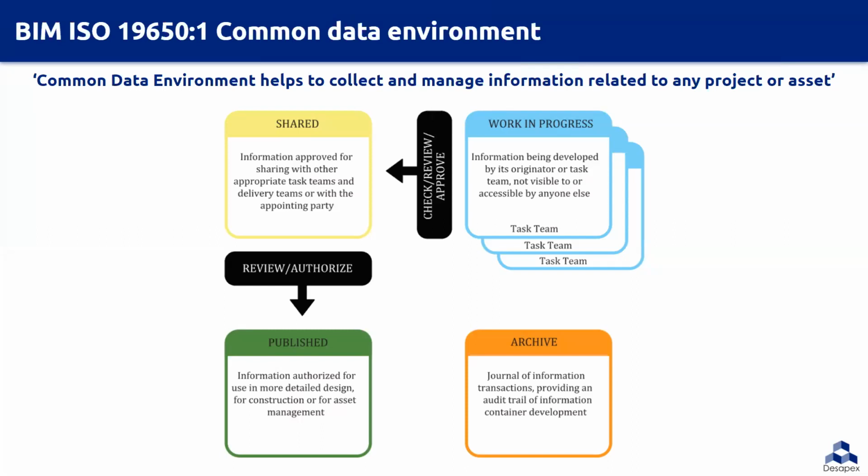So the first stage, the work in progress state, is used for information while it is being developed by its task team. So the information container in this state should not be visible or accessible to any other task team, particularly important if the CDE solution is implemented through a shared server or web portal. Once the information is developed to the required state, it transitions to a shared state.